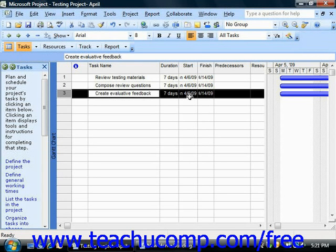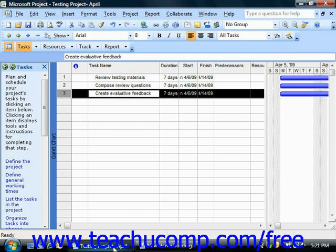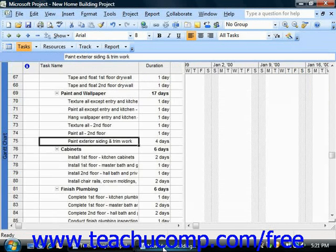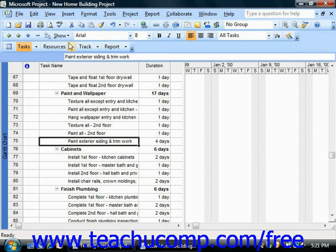Also note that it's possible to schedule tasks to occur on non-working times, as indicated by your scheduling calendar. So for example, assume that you need to enter a task such as 'wait for paint to dry' when creating a remodeling project file.